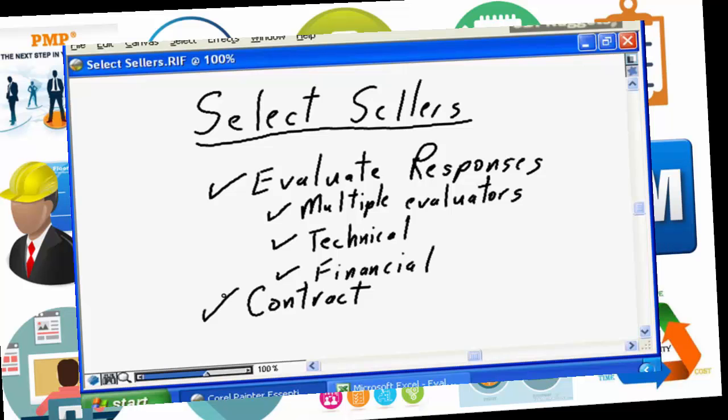Unless you have your degree in law, which as a project manager you probably don't, I certainly don't, I defer all contract discussions, all contract negotiations in terms of the pure legal aspects of the contract to specific legal authorities in my company or specific legal advice solicited by the company. But the key but is you let the legal people look after the contract terms and conditions, but you, the project manager, need to be intimately involved with the contract process in terms of the statement of work.